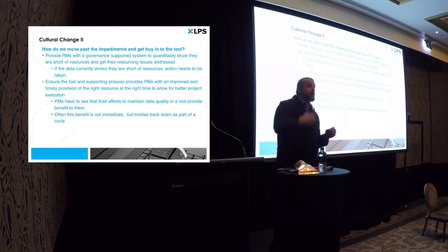And one of the key selling points that you'll need to convey to the people doing the data entry, the project managers, the resource managers, etc., is what benefit is there for me? I guess with PPM tools in general, the immediate benefit is automated project status reports. That's probably our biggest selling point when we go to people and say, rather than spending an hour to cobble together your fortnightly status report, as long as you've got the data in the system, we can get you to do it with a couple of clicks. That's a really good selling point, but often that's not enough to sell them on the tool. So how do we actually get resource managers and project managers enthused about spending the time to put their data into the tool without it becoming an overhead, so they get some tangible benefit?